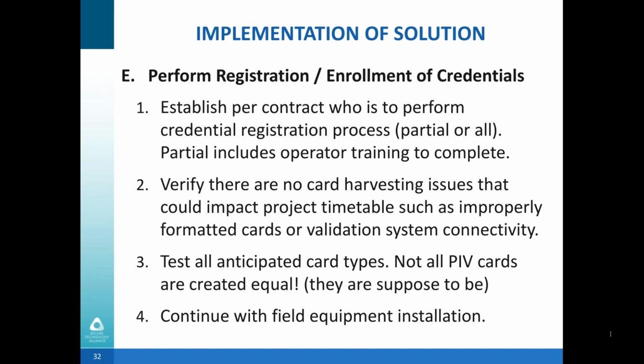Next, continue performing the registration plan as designed. Be sure to establish in advance or per contract who is to perform the credential registration process. Would it be a partial or sample set, or will it be all of the credentials, which could mean hundreds or thousands? Partial may include training client employees to continue the process if you're going to do a partial.